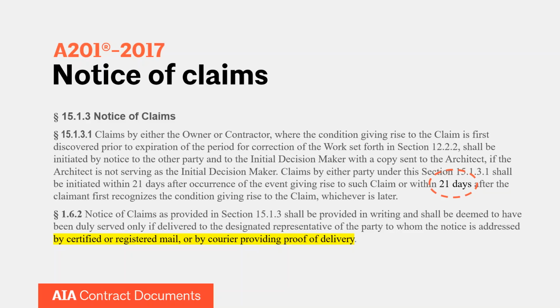So I would say maybe a less confident yes than last time, but perhaps still a yes. My gut would be probably, if you have, for example, to quote 8.3.1, an unusual delay in delivery of Italian marble, or you're waiting for scaffolding that's just not arrived yet, and you can't do your work and it's on the critical path, then that would probably fit within 8.3.1. The only additional thought I had as you were asking that question was that this probably raises the issue of mitigation.